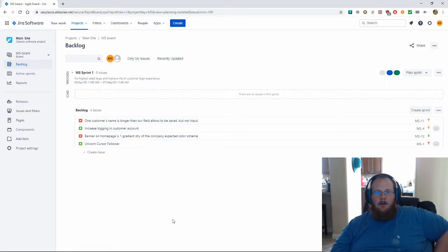If a new feature comes down the pipeline and it's because a new high value customer has said that they'll sign up if we implement this new feature, and they're worth 100 customers in value to the company, then we're going to want to derail the active sprint if there's anything in that sprint or iteration that we're working on with less value than 100 users. And so that story can derail a sprint, and I've seen it happen.